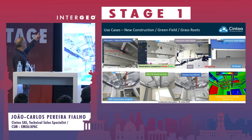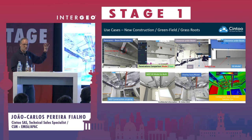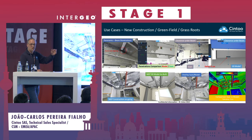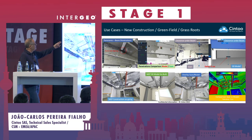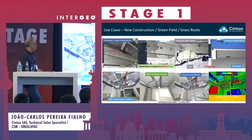These are real cases of ducts not aligning. By using scans — even in new construction, when doing civil works and wall penetrations — you can scan quickly with a mobile device, get the position and size of the reservation, and adapt your duct design to match the actual position rather than the theoretical one. You can compare model to scan or two versions of scans. On the left side, you can see the delta between the scan and the 3D model below the BIM was about seven centimeters, which can cause a lot of changes and delays. If you can identify this beforehand, you can solve the problem before going on site.